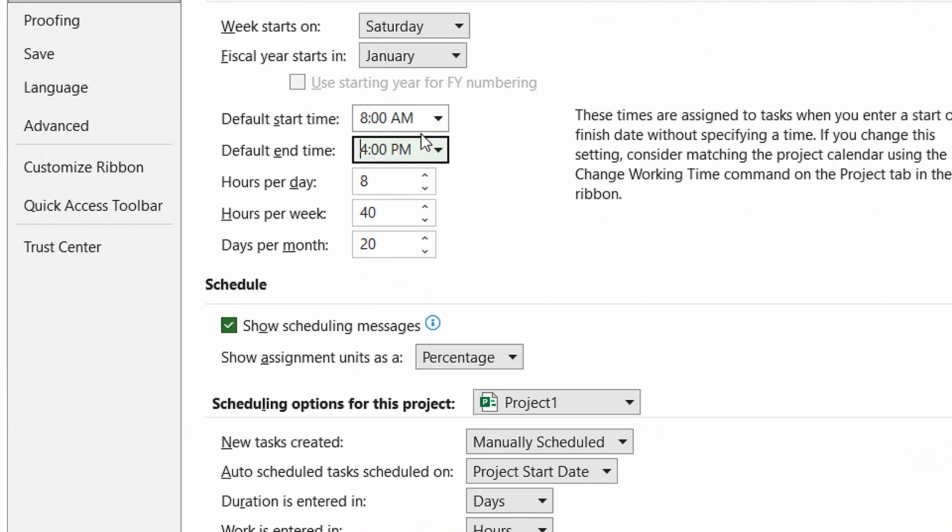Okay. But for the week, we can multiply the 8 by 6, because we have one day as a holiday. It's Friday. Okay. So we have here 48 hours of work per week. And as a result of that, the working days per month will be 26. Why? Because we have 4 days as a holiday in general in a month.